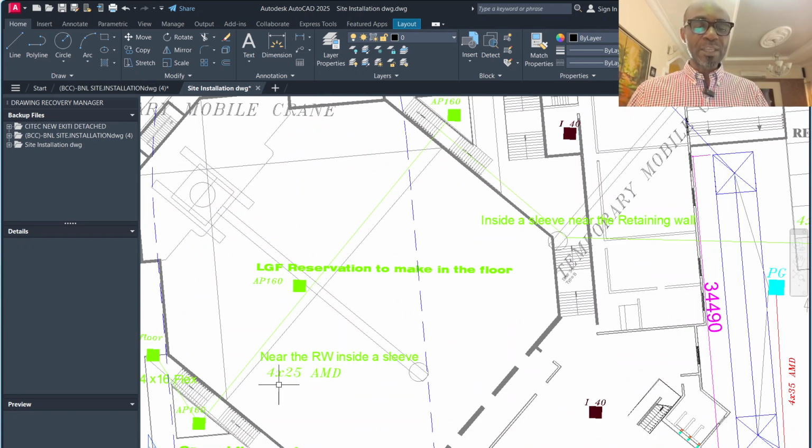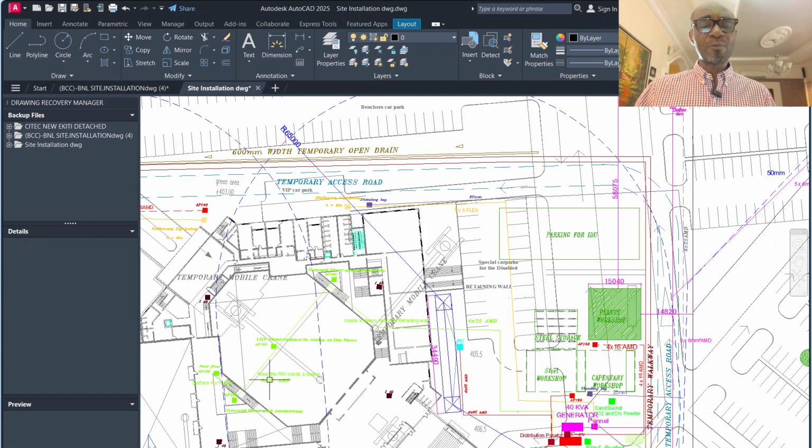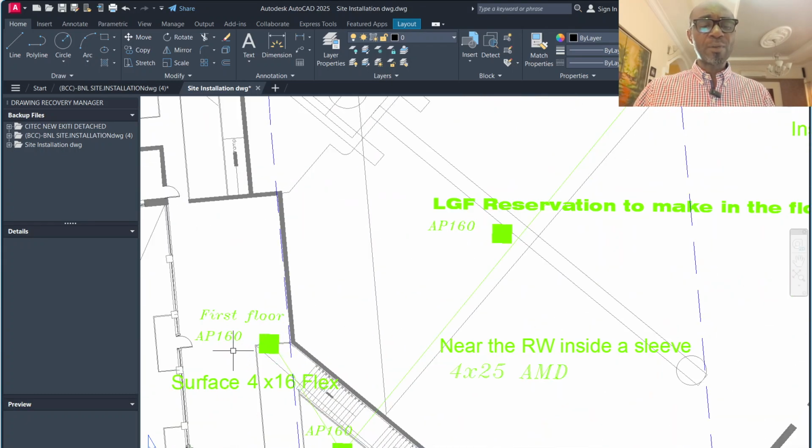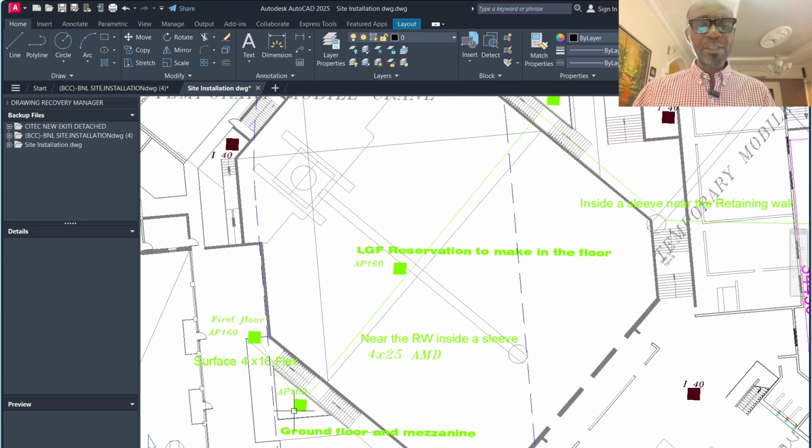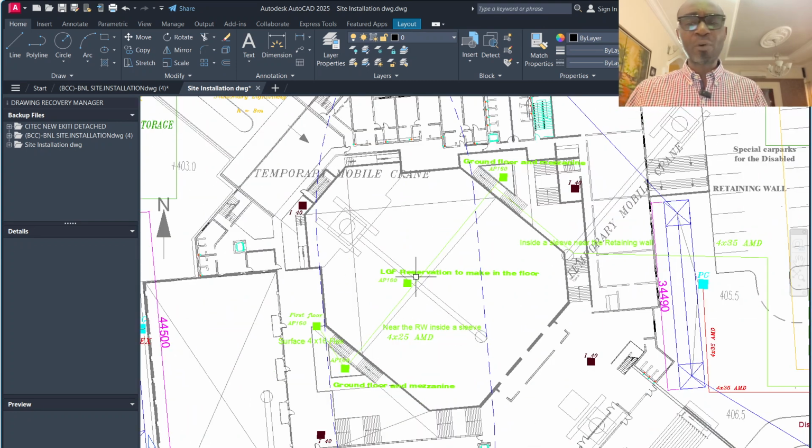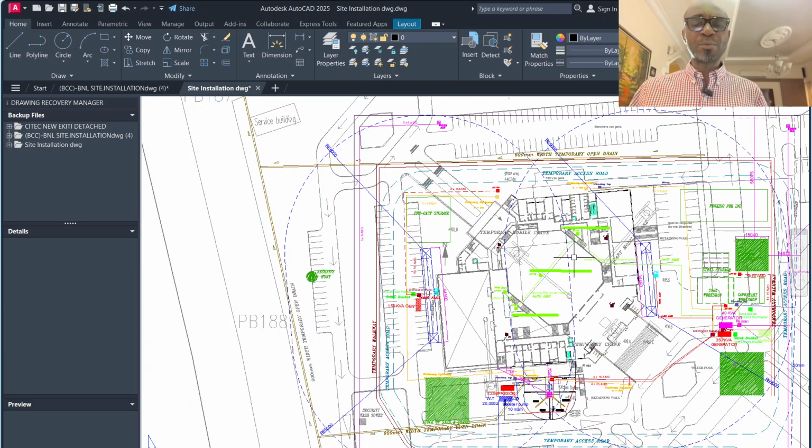Then you have all of the cable. So you can measure your cable. You can measure how many distribution panels of different sizes you need to provide, where workers can easily tap, connect the extension for work and all of that. Then there are other smaller panels, the I40, that are provided at floor level and it has multiple outlets that you just connect your whatever.